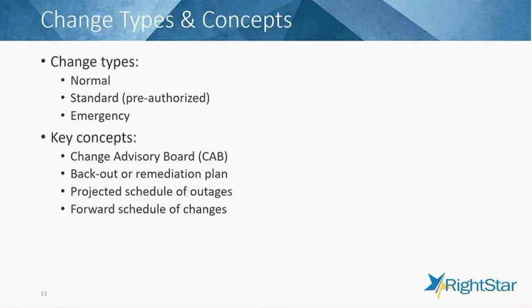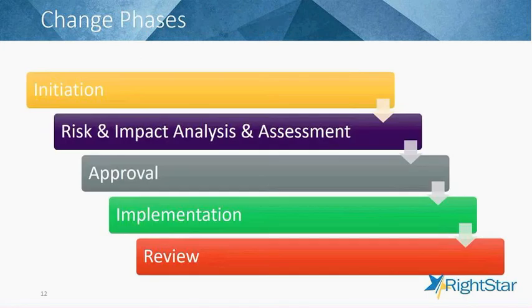So going back to change management, we have this environment, if we've deployed Agile, whereby we've got a lot of changes happening on a much more frequent basis. When we normally think about change management, the normal or typical change would be a large rollout or a large release. What I would argue is that when you're using Agile, you should be pushing down the levels of authority.